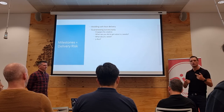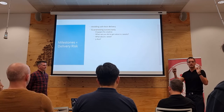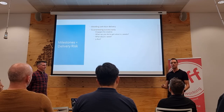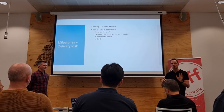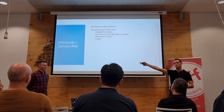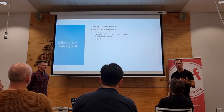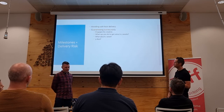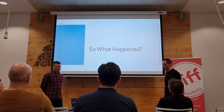It's going to pop up and just show the head of marketing this thing only if he logs in, because we're going to hard code something and check cookie if Steve Lawrence. I was like, cool, you've just de-risked this thing. Steve can now see it in prod, right? Good. Then we're going to change that to an A/B test script, but again, we're going to hard code all those things. Cool. Then we're going to move that back into a database. Cool. Now you're talking here. Then we're going to put a back end on it so that we can automate this and change who can and can't see this pop up. Now we're talking, so we've done the cake thing, and we're not throwing things away each time. So that allows us to think of milestones, and these milestones often are business outcomes.